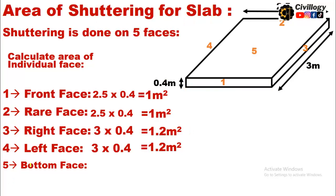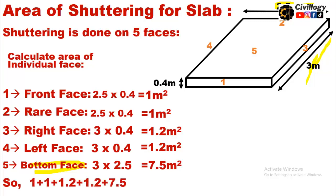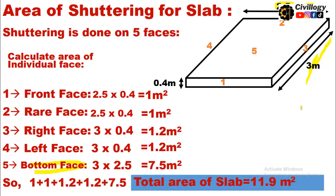For the bottom face of the slab, the length is 3 meters and the width is 2.5 meters. The entire bottom of the slab is covered with formwork or shuttering, so the area is 3 × 2.5 = 7.5 square meters. By adding up all these values, we get the total shuttering area required for the slab: 11.9 square meters.